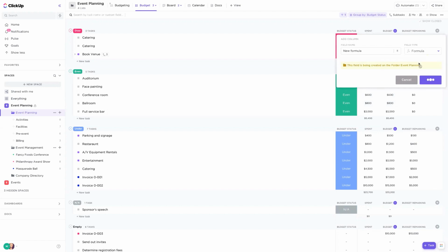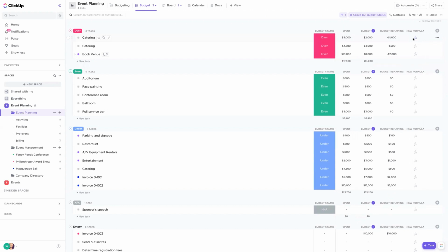And once you add in that column, you'll be able to come in here and choose the fields that you'd like to calculate with the formula. So maybe I'd actually want to see my time estimated here. So what was my planned duration for all of these tasks minus what I've actually tracked on them. And we'll be able to calculate that to see what's the remaining amount of time that I have to work on these tasks until I've hit my planned limit.